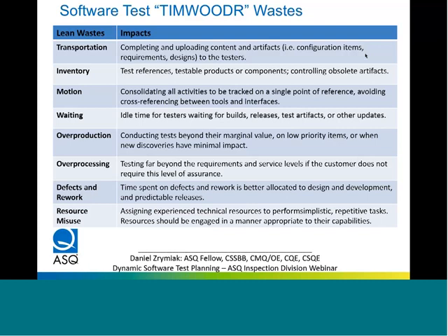Performance testing is very important because you're simulating how the system or solution would work under simulated usage levels, peak levels. But at the same time, if you're required to build something that can be used concurrently by 1,000 users and you're testing it to 100,000 users, you will find limitations, but those limitations could be beyond the scope of what you're expected to deliver.